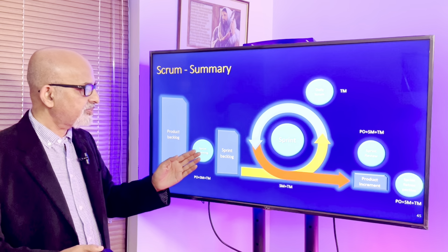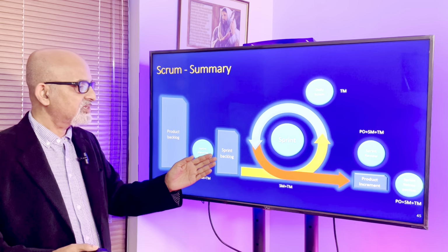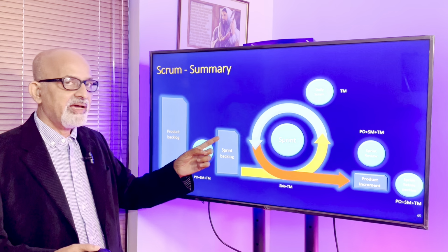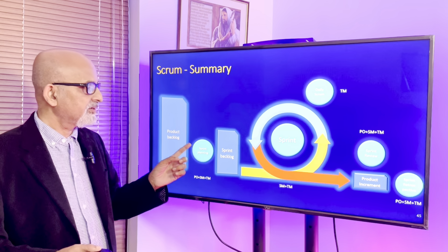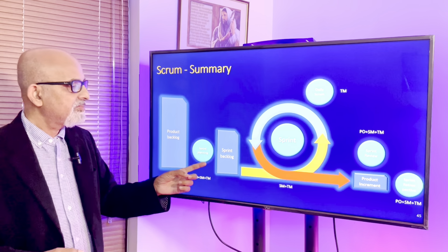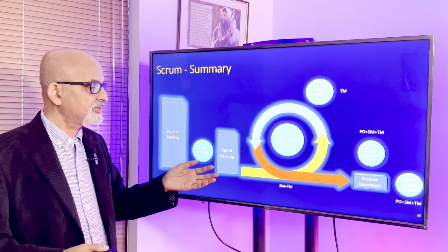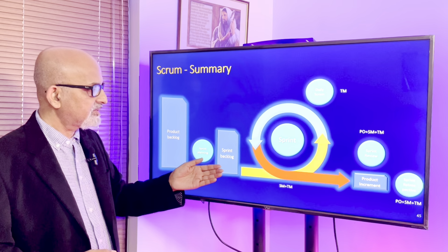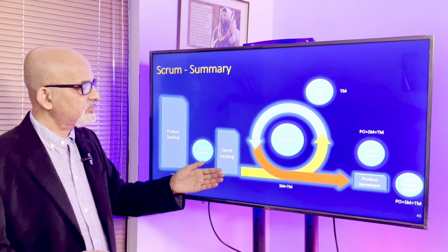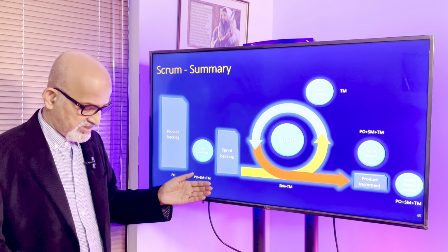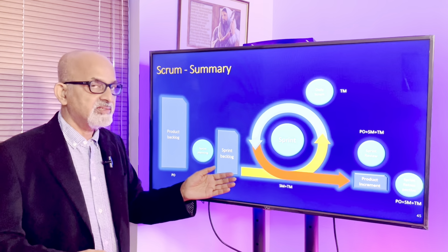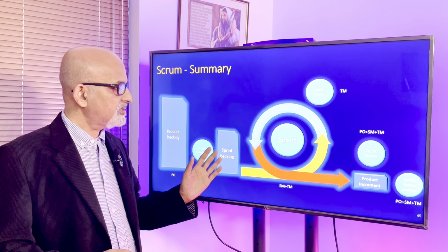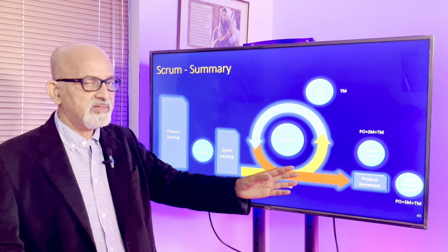At the end of the sprint planning meeting, you will have an agreed upon sprint backlog coming out, which will have a sprint goal, the features to be developed, maybe the features further decomposed into activities, estimated, and a plan of action to build it. So everything put together forms the sprint backlog. And the team self-organizes and they get into the sprint, trying to convert these backlog items into a product increment.